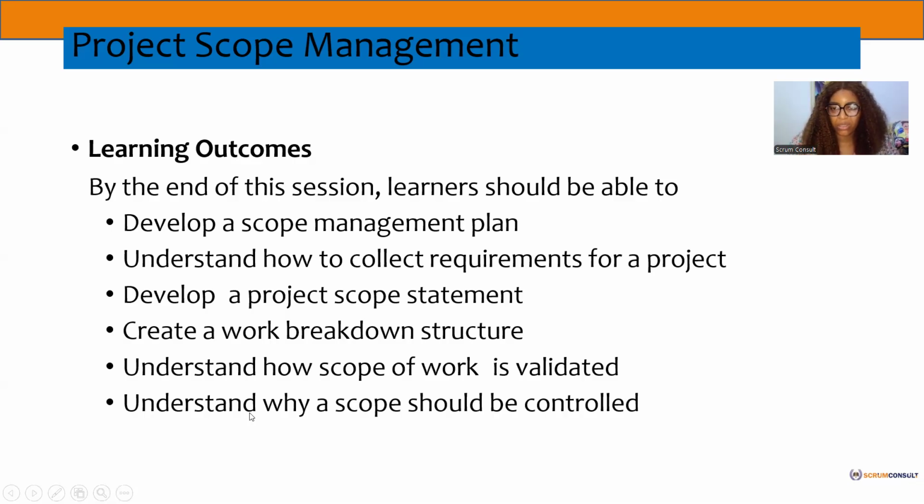Work decomposition is very, very important because at the planning stage, at the initiate phase, remember we had talked about the high level scope or requirement. We captured it. So we now have to sit down and collect requirements and start breaking those requirements so that we'll be able to understand the activities needed to create each of those work packages, which is like a work decomposition package. And we'll be able to know how to estimate our total project duration from that.